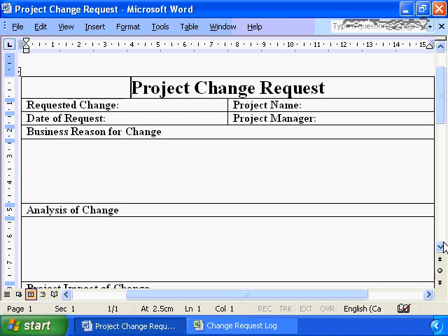If B is documented as a flaw in the requirements definition document and the business wants to change that, issue a change log that says on X date you issued a change with the business reason for change: B is no longer a flaw, analysis of change, business impact of change, final signature. That is your approval. That is your justification. That is your audit trail that warrants, justifies, and validates whether or not B as a flaw is included in the final system. If it's on a document, if it's been signed off, if it's approved, that's what your project is obligated to deliver.